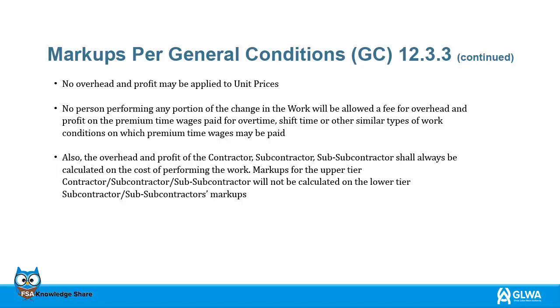Also, the overhead and profit of the contractor, subcontractor, and sub-subcontractor shall always be calculated on the cost of performing the work. Markups for the upper-tier contractor or subcontractor will not be calculated on the lower-tier subcontractor's markups.